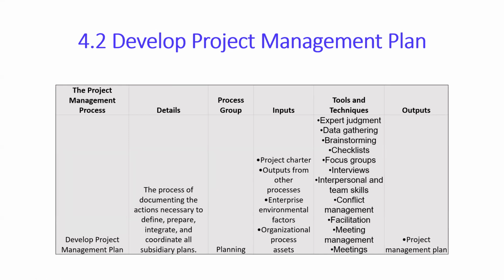Important things for a PMP examination: know the differences, know the orders of planning, know what all a project management plan is made up of. It's going to take like 3-4 days to make a project management plan. You'll start working with the scope, you'll break into activities, work with structures, the activities, and then you kind of start estimating things, and then you start putting in things like the quality. Then you find people on the project, then you talk about the communication plans, then talk about the risk identification, risk mitigation. So all of these things will come as a part of a project management plan. Okay, so that's your develop project management plan process.